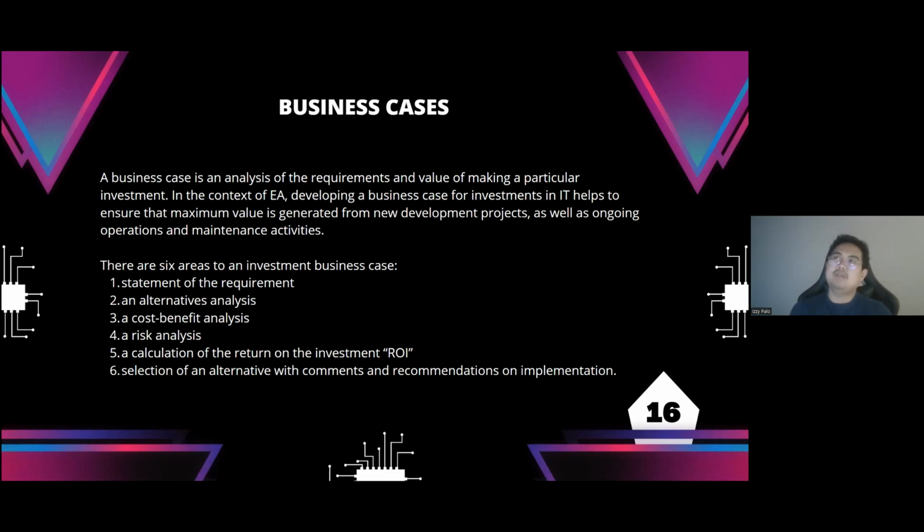Maybe we can say that this is like a hypothesis in a thesis. Next, we have the alternatives analysis. It contains the analysis of several alternatives to meet the business requirement. The requirement may be to upgrade an existing component in the enterprise architecture, develop a new one, or provision support services. These alternatives can differ in recommended process, technical solution, type of personnel, and so on. One of the alternatives can be the status quo, or just keeping it as it is and doing nothing. That's another alternative.